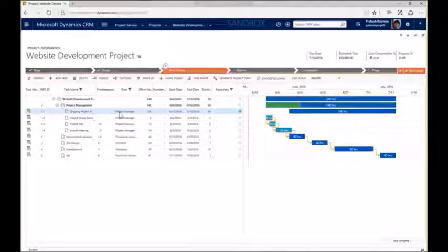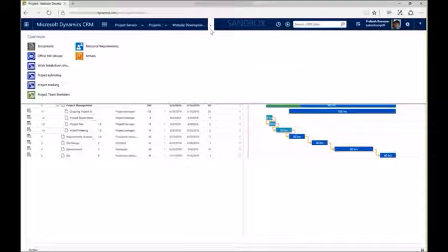Now, if you remember, I had 4 roles that we needed. We needed some PM time, a functional consultant, an architect, and a developer. Okay? So now, when I choose the Generate Project Team button here on the WBS, it's going to analyze this WBS for me, look at how many people I need based on my constraints for each role, and then propose that team makeup and put the requirements together for me of who I need when.